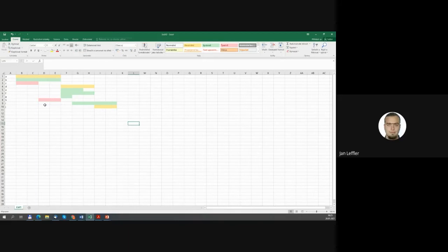There are activities that are required for following activities, in my words. Okay, but in this example, the activity A, the yellow activity, is on the critical path because they are connected and there is no reserve among them.